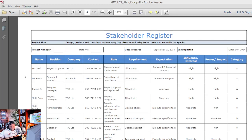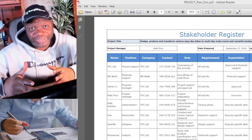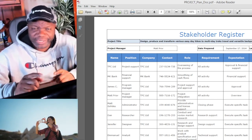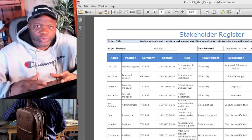When you get done with most of the initiating basic stuff, you then begin incorporating more of the planning, executing, monitoring, and controlling, and not in that order, because you could have the project charter developed on day one. Perhaps by day three, you're now looking for team members, okay? You haven't even finished planning. You haven't even really started planning, but you're immediately thinking about getting people on so that you can engage their services to help you plan. Did you ever think of that? That you don't really finish executing before you go into monitoring and controlling.